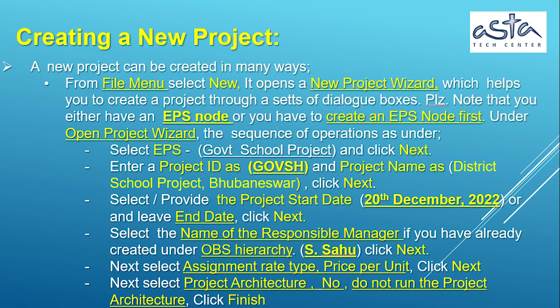Select the name of the responsible manager, if you have already created it under the OBS hierarchy. S. Sahu, click Next. Next select assignment rate type, price per unit, click Next. Next select project architecture, no, do not run the project architecture, click Finish.